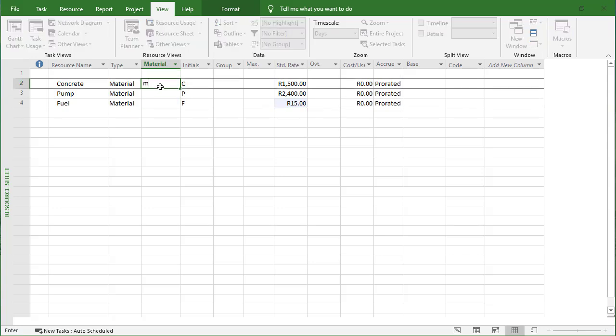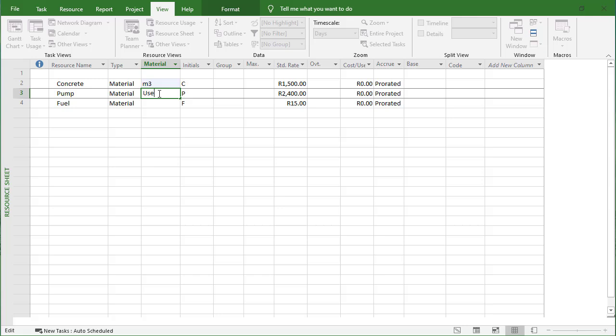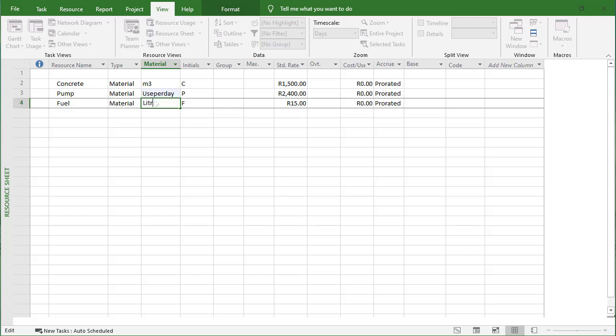In terms of units, I'm going to put in cubic meters for the concrete, the pump will be a use per day, and then the fuel will be measured in liters.